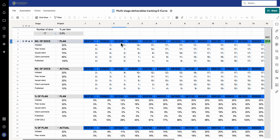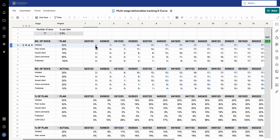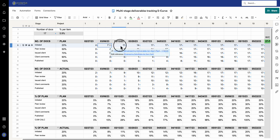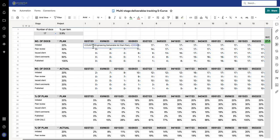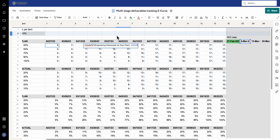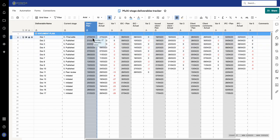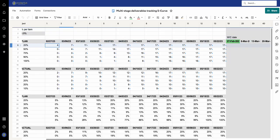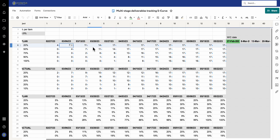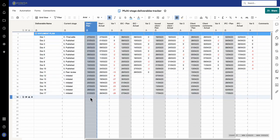So you can say: what is the value of what's been delivered at each stage? How many documents were due to have been initiated then? So this is the various calculations — how it's working it out. It's saying: count if the date is less than the 6th of March, looking at this sheet here, and this reference goes to this column and says count how many have got a date less than the 6th of March — 1, 2, 3, 4. So this column here is doing exactly the same but looking at the following date, counting that same column with the start date of the plan, and so on across this piece. You can see all of these have got a start date so they will all fall somewhere into that plan of delivery.